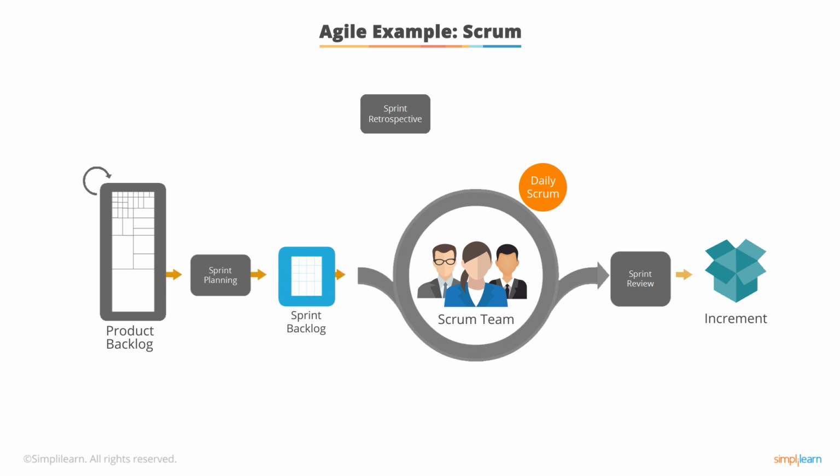Now, the trick about Agile is Agile understands that software development can go on forever. And so to address this problem, because nobody wants to spend money for projects that go on forever, Agile practitioners time box a sprint. And typically a sprint will last anywhere from 2 to 3 weeks. Some companies do 1 week. Some companies actually do 4 weeks. But the notion is a sprint is a time boxed period of work where what happens is what happens.